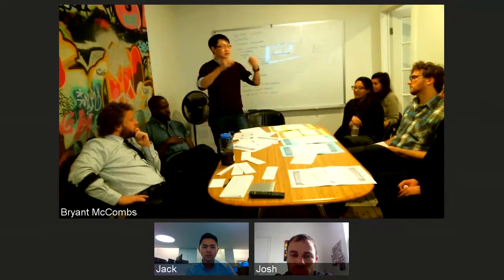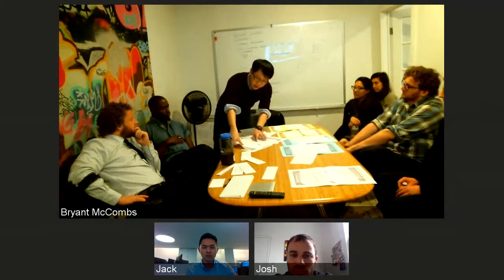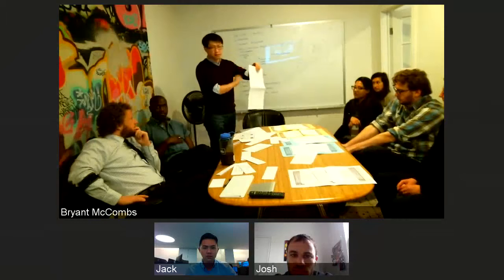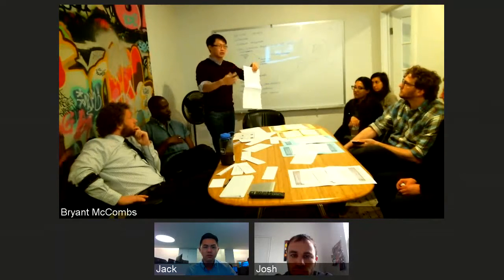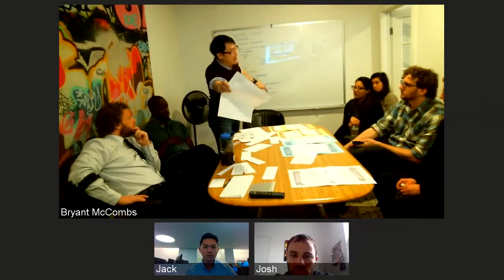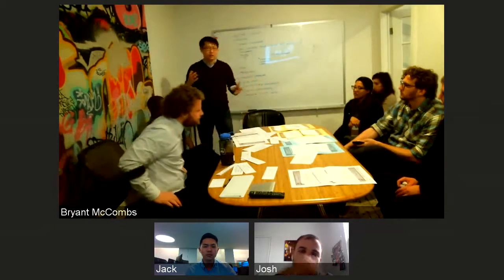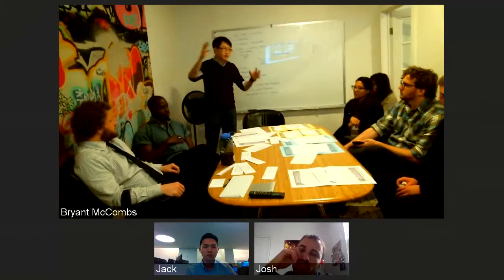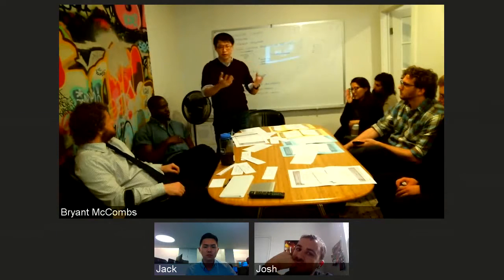Then you break those down. You can start with very vague estimates for large feature sets. You might just write down on one of these planning sheets, payment integration. And then as you near it, you put that further out and say, okay, we have a vague idea. It takes 2 weeks to do payment integration, maybe. And then as you go out, you start writing real cards for it as you near it, because you have design work that's being done around it, hopefully.